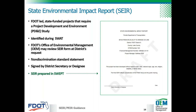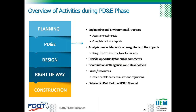The SEER form allows for concise documentation of the results of the engineering and environmental analysis and coordination. The SEER is prepared and approved at the district level, so districts may request OEM review if they would like. The SEER summarizes the results of the engineering and environmental analysis, including the assessment of project impacts and completion of technical reports. The amount of analysis needed depends on the magnitude of the impacts, which could be from minor to substantial.